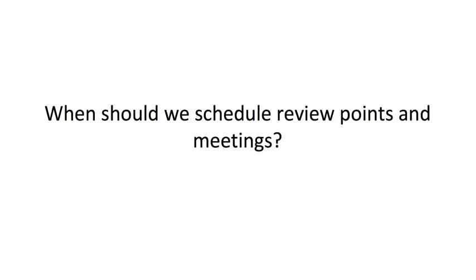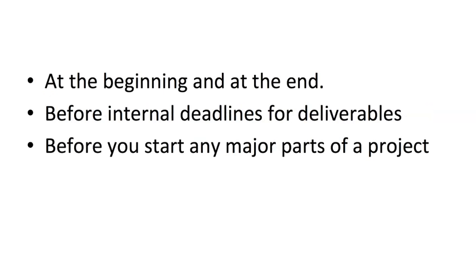So once again, to emphasize, when should you be scheduling review points and meetings? You'll want to have review points and meetings at the beginning and at the end of the project, before any sort of major internal deadlines for deliverables, and then also before you start any major parts of a project. Remember, you want to be strategic. Be careful about having meetings all the time. Meetings should be scheduled around big parts, big picture ideas. They should be used strategically. Avoid having meetings just for the sake of having meetings.